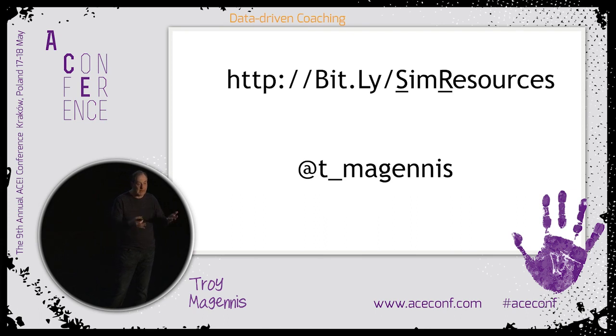The interesting thing about automatically importing data from tools is you get all the noise and the mess as well of things that will never ever happen again. And if they truly are abnormal, something went down, your whole production was down, that doesn't help people spot abnormal in a trend. So I would rather not show that data. So having charts built into tools tend to lose the context of what was happening on that week and that period of time. Whereas in a spreadsheet like this, you just delete the row or delete the record, and now it's gone from the team's visibility. So once they explain it and it's abnormal, I get them to delete it.